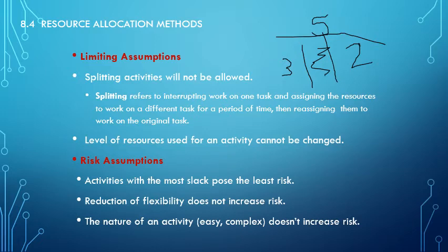Risk assumptions that we would have: activities with the most slack pose the least risk. Reduction of flexibility does not increase risk. So if we take time out of the schedule and put the activities in line, we're not increasing the risk of the project, and the nature of an activity, whether easy or complex, doesn't increase the risk.